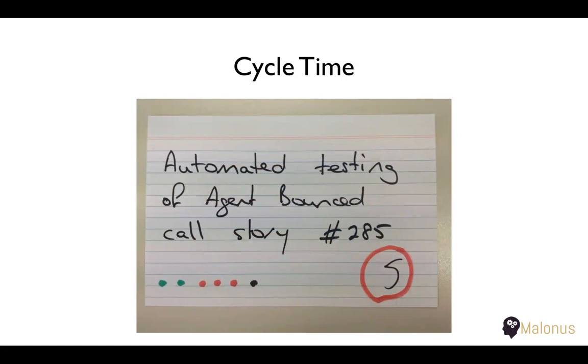So this is about the cycle time. Even though you have started working on a card, how much time is it going to take? That really is important as part of Kanban, but I generally feel that it is important for anything, whether it's Scrum or Kanban, both. Because what you want to see is that whatever you have started should be finished first, instead of starting a lot of cards and doing nothing about them.